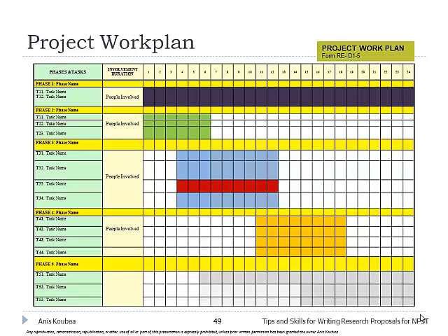So, for example, in this work plan, after 6 months, phase 2 should be completed, phase 3 should be started. In the evaluation, they will go back to this work plan and they will ask you what is the percentage of each task accomplished. And the percentage should actually be as close as possible to what you estimated in the plan. And if there is a deviation, you have to provide a justification.